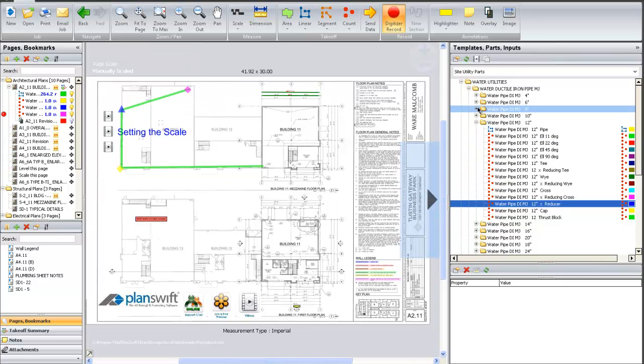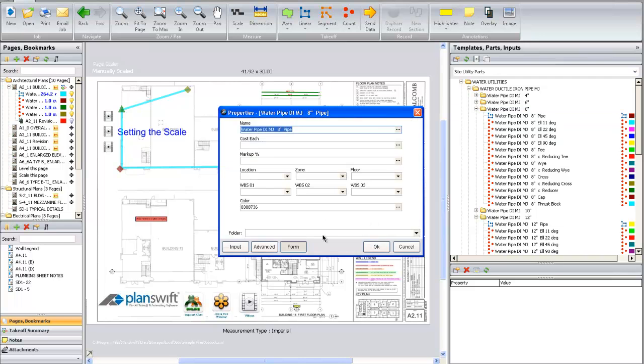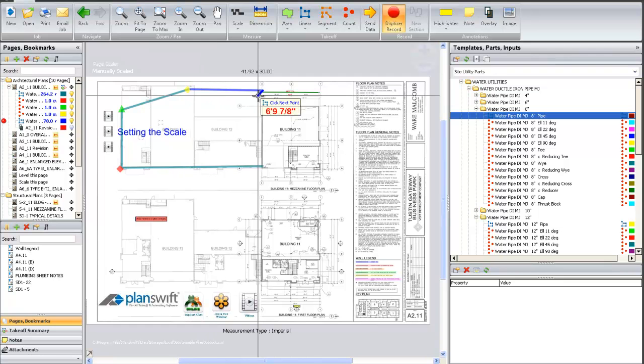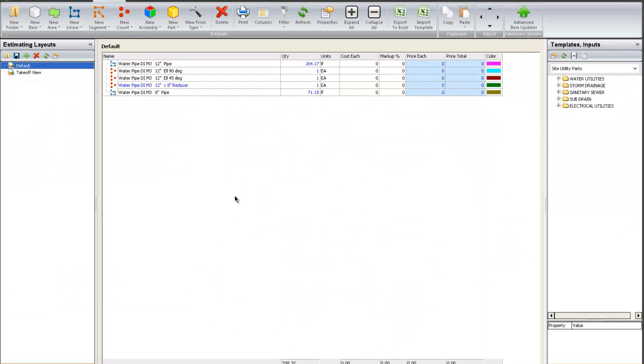If I would like to continue a little bit more takeoff and say we have some 8-inch pipe, then here's my 8-inch pipe, and I'm just going to do a little bit here to finish that out, and I hit escape when we're done. Now all of this takeoff is being recorded by the software. So you can notice that for water, the 12-inch pipe, I got so many feet. I got 190, 145, 112 by 8-inch reducer. Notice that I'm giving you the size of the reducer from the pipe size down to the reducing size here. And then here's the 8-inch pipe for 71 lineal feet.